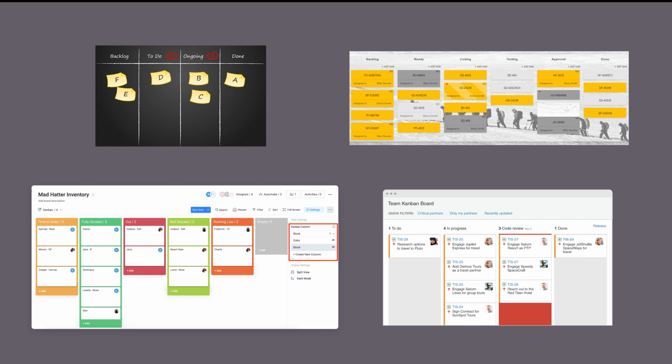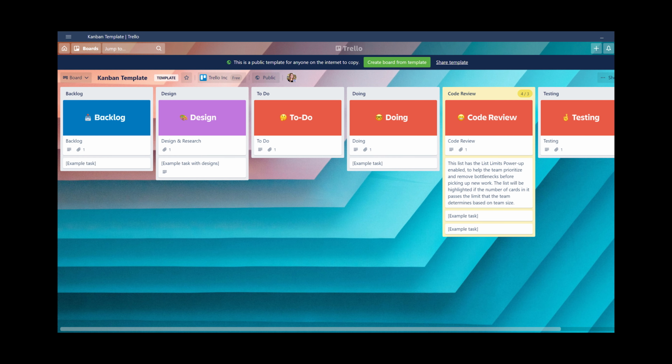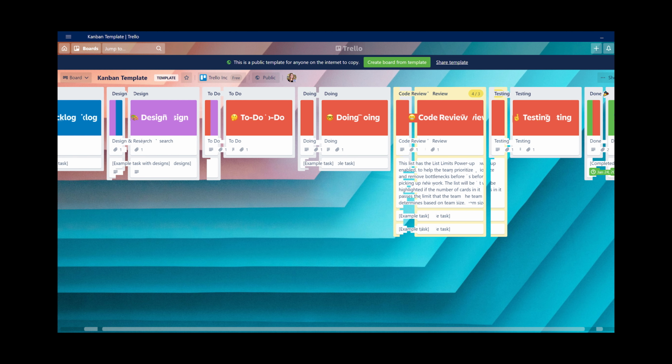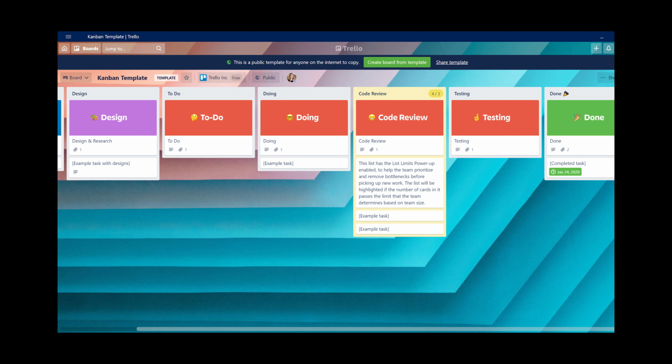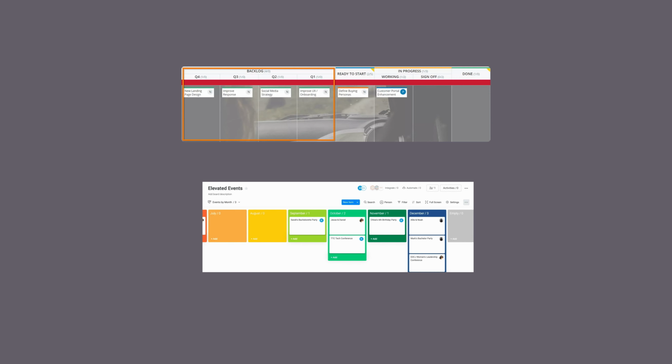It should be justifiable. Another thing you might want to introduce to your Kanban system is a more granular column system. It's a good idea to include some kind of backlog or backburner column where you put down things that need to be done in the near or distant future. This is a place that can get messy and lengthy, and it is important to review it regularly, at least once a week. More often if you're working with a large team. If it becomes too large, you can separate it into quarters of the year or even months.